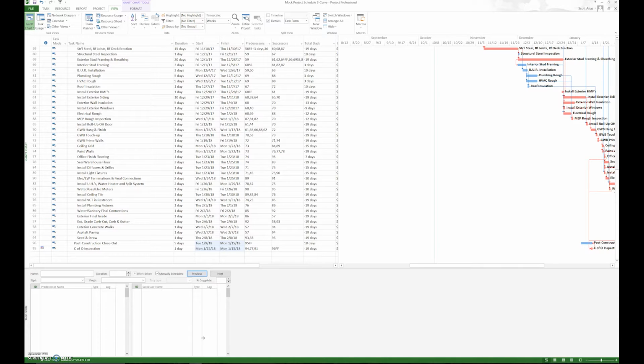So as we did before, we're going to use primarily two means of reducing the duration: changing a relationship, or adding more manpower. You can see after we've gone through and added resources in, reduced excess float, and removed redundancies, we're 19 days now over our contract completion date, our CO inspection. So what we're going to do is say, okay, interior siding, we can double the amount of resources there after talking to our subs, so we go to 5 days, okay?